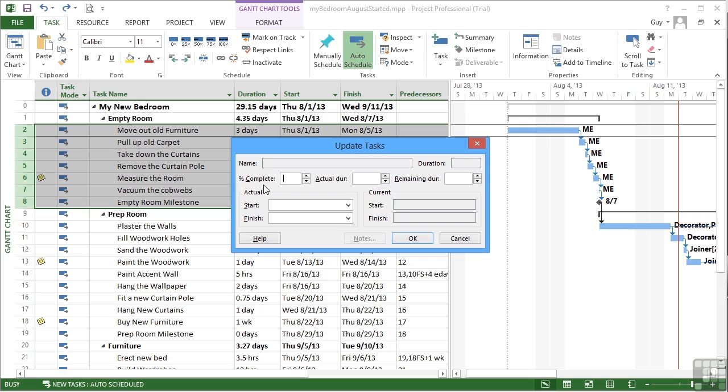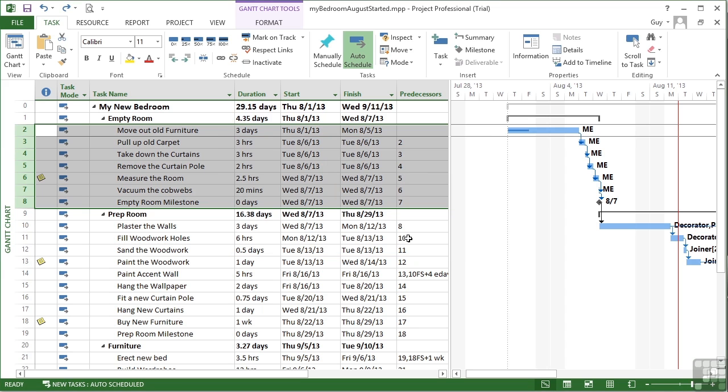Now you can see in here that because we've selected multiple tasks, not all of the boxes are available and not all of the boxes can be entered into, but I can enter the percentage complete. So I could say all of these tasks are 50% complete. OK, and they all get marked as 50% complete and you can see the progression bar within them, just about on these smaller ones.